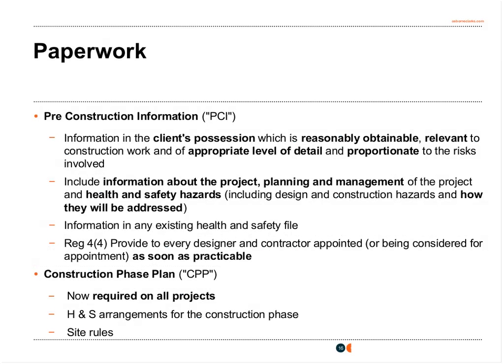And the client must provide the pre-construction information to every designer and contractor appointed on that project as soon as practicable, so as early as possible in the process. The second key piece of information, which we've already touched on, is the construction phase plan. This is now required on all projects, so not just the projects where there is more than one contractor or where the project is notifiable.